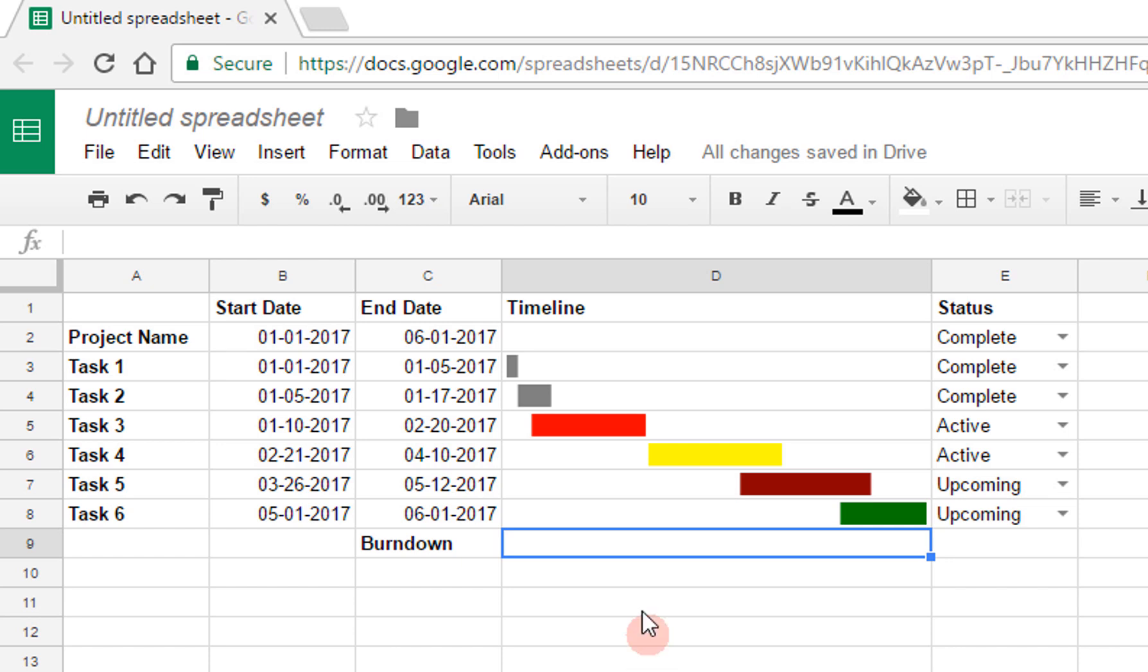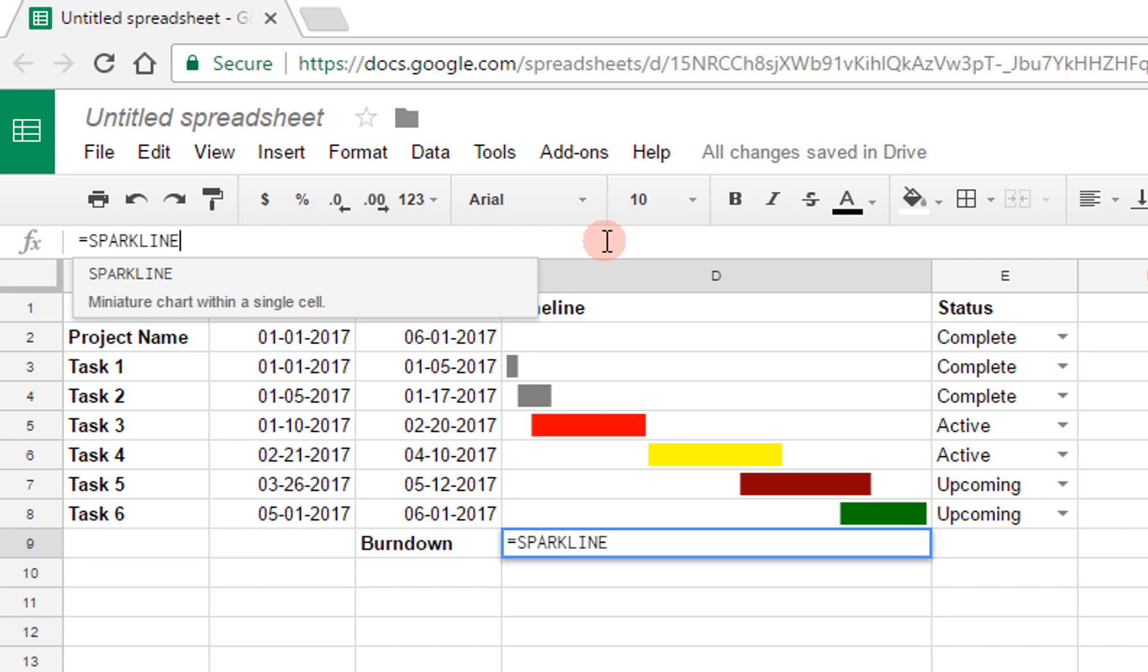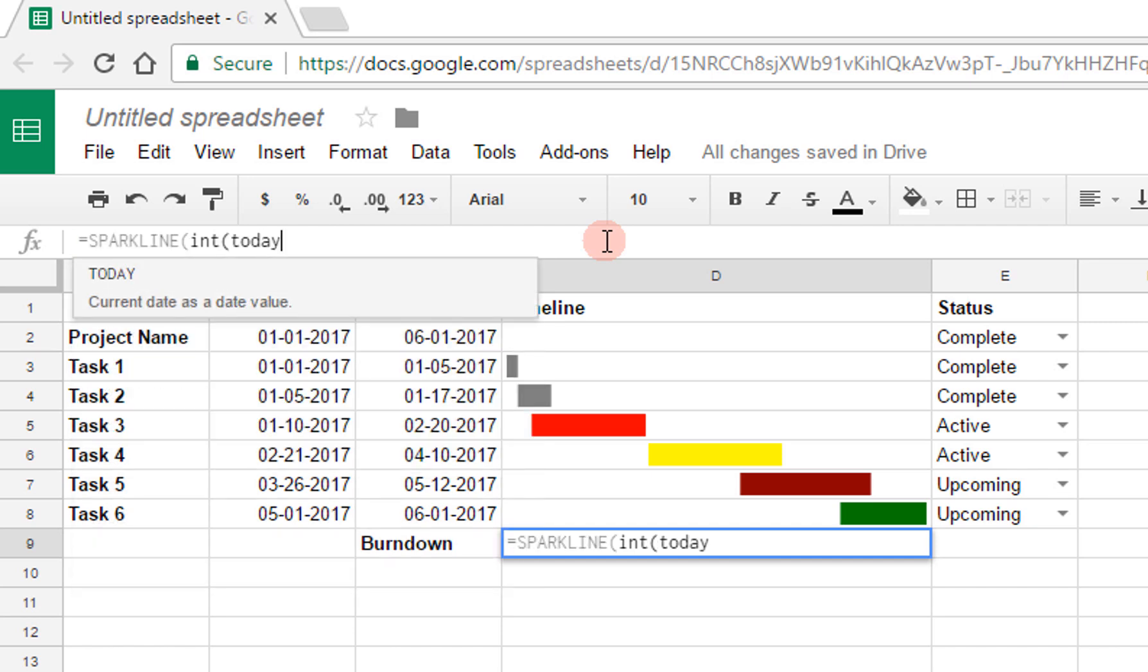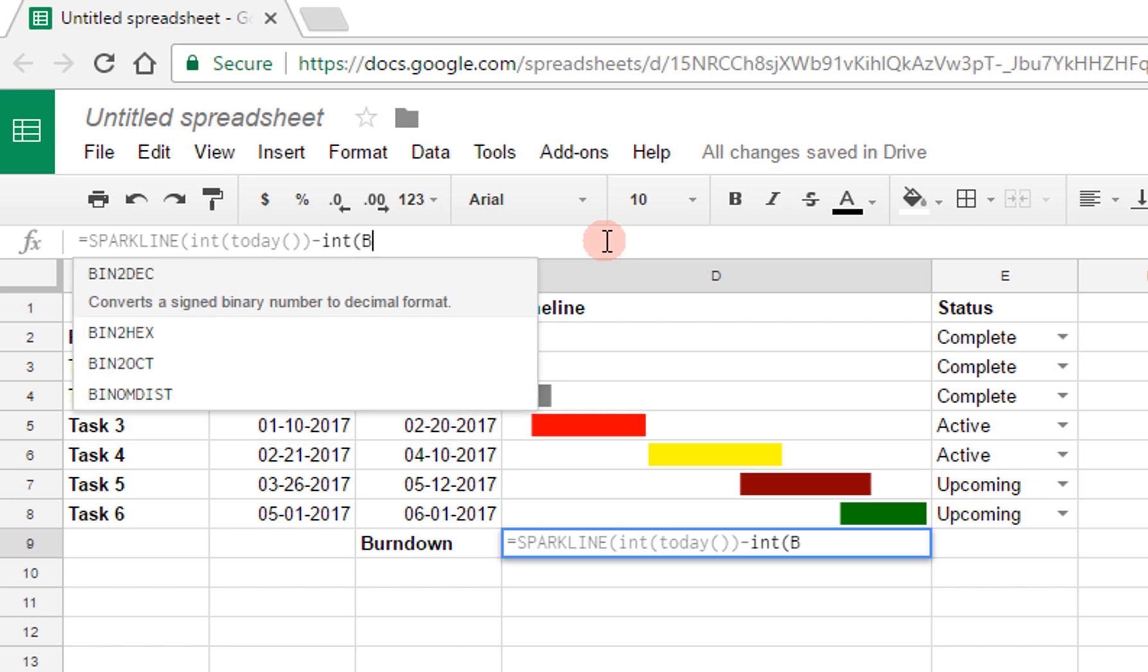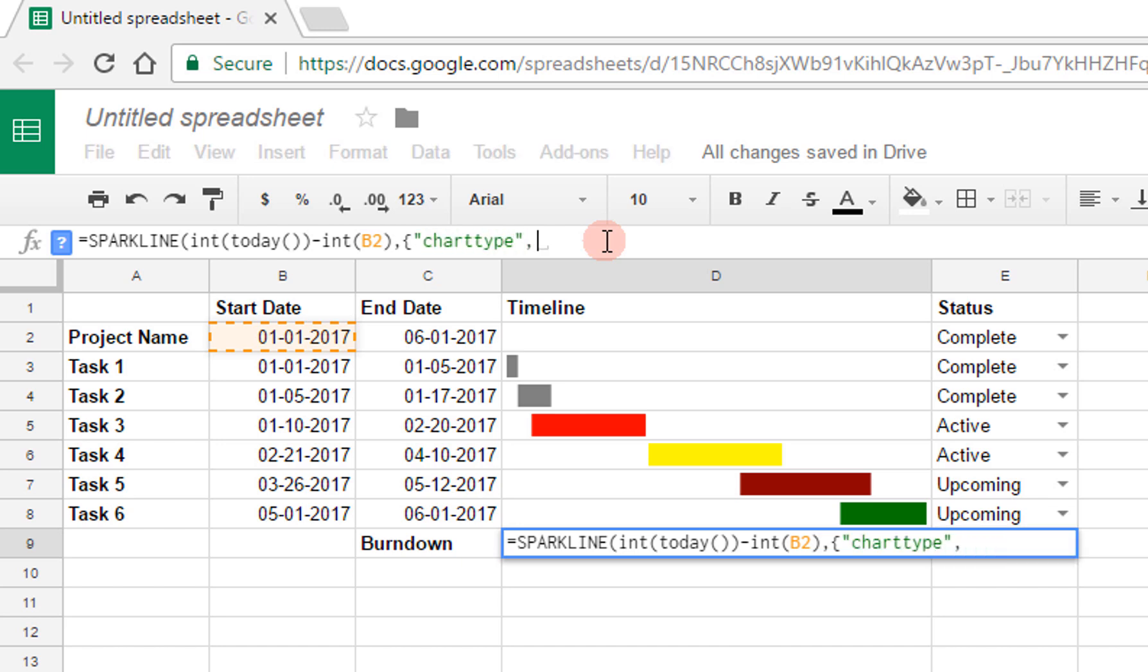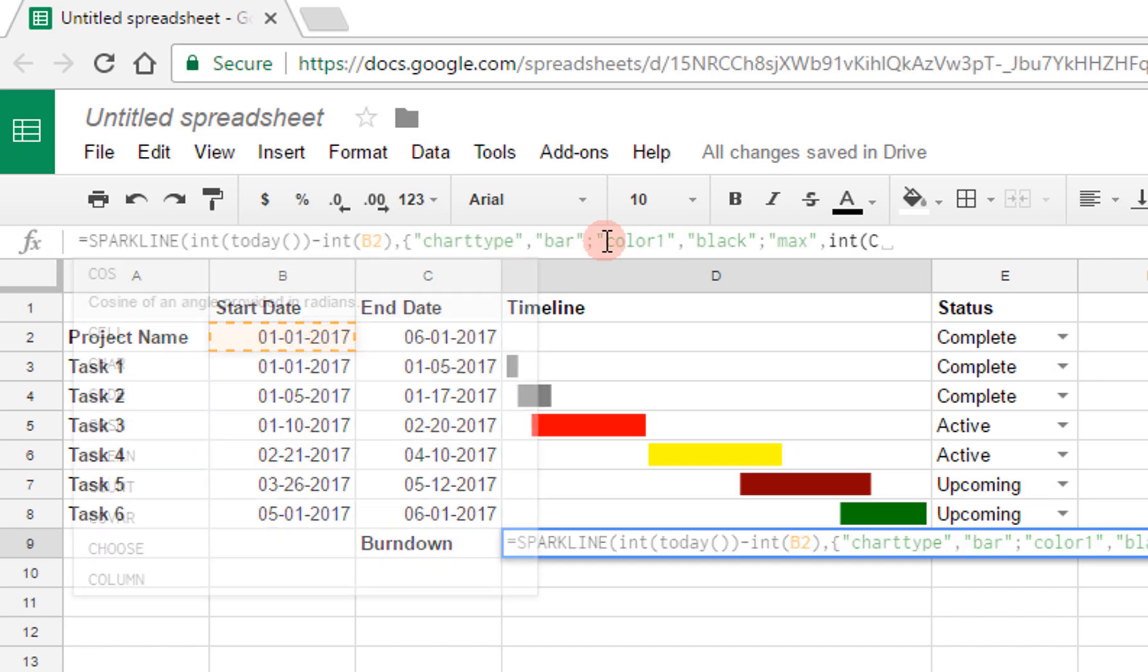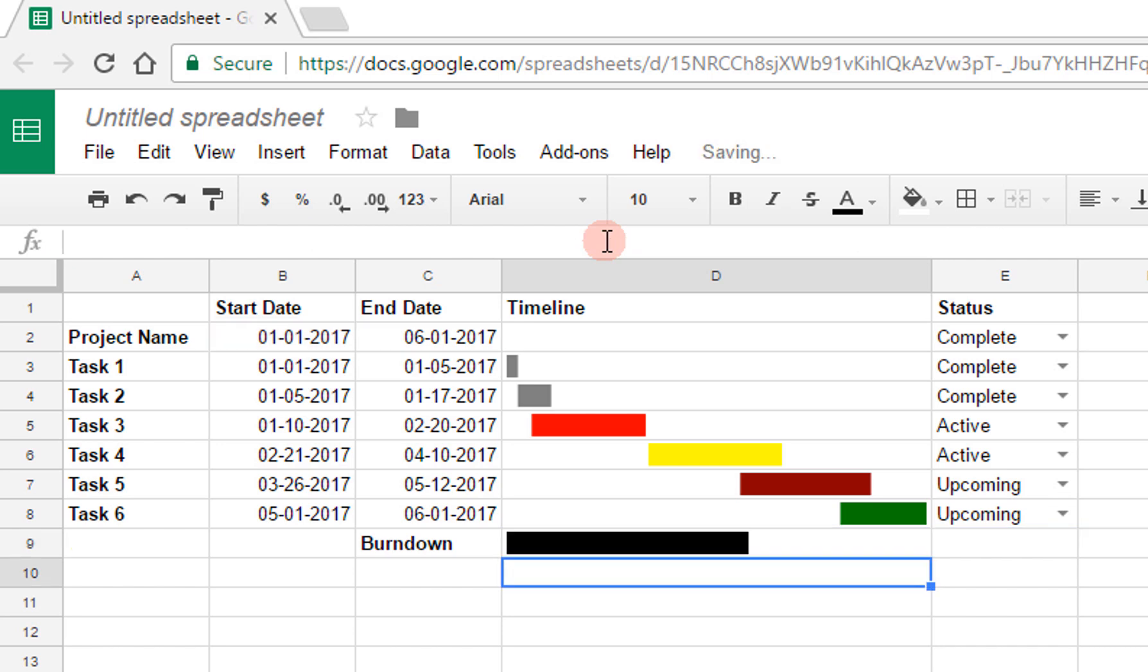And so for this one, I'll use another sparkline, and this will be simpler. Here, what I want is the data just to be today minus the start of the project, and once more, it's going to be a bar chart, where color 1 is going to be black, and once more, the max is going to be int c2 minus int b2. I don't bother with the dollar signs here, because I'm not going to be generalizing this to any other cells. It's just going to remain in this one, and that's it.